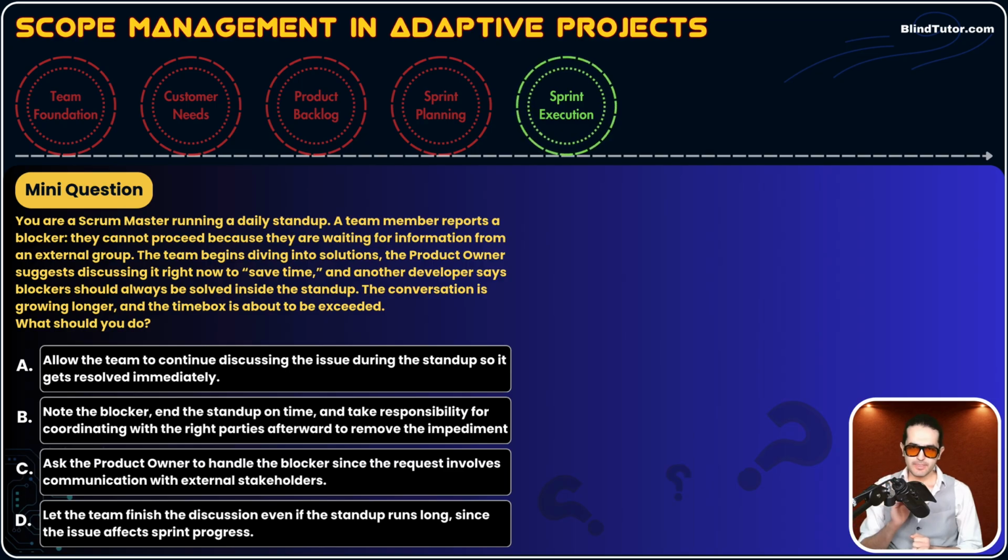Great question. And it touches on your discipline and your role. Guys, we said adaptive projects are flexible, and in that flexibility, we still have some structure. For example, sprint length, that 2 weeks or 1 week or 4 weeks length, is one of the structures. When there are issues and problems, we don't extend the sprint length. Same thing goes for daily stand-ups. Guys, it is a 15 minute talk. If you agreed in the early days of the project on a 15 minute talk, it is a 15 minute talk, not more than that.